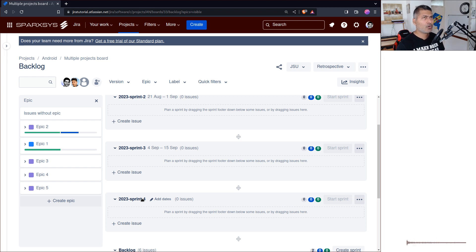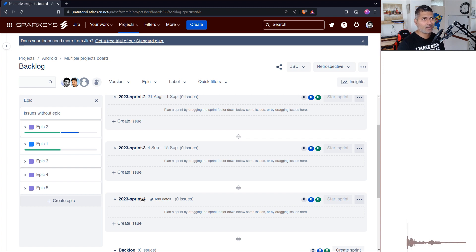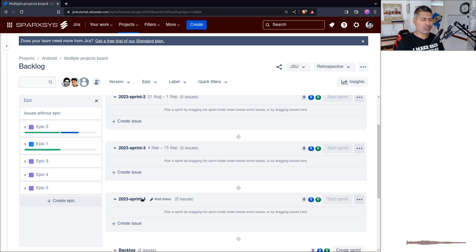I've seen people and teams using version names in their sprints, but what is the point? If you're using fixed versions in your projects anyway, there's no need to also embed version names in your sprint names. I'm not saying don't do it — I'm saying reconsider. Use fixed versions for versioning and name your sprints with the year–sprint–number format instead.